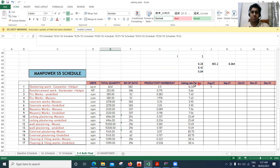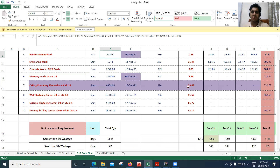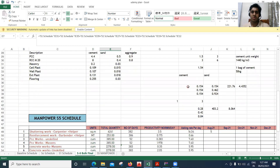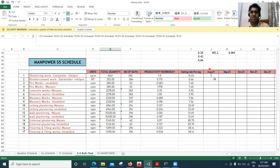Now coming to the asking rate per day — it's simple: total quantity divided by number of days gives you the asking rate per day. For example, you can see here the value 38.14 — same thing is reflected here.